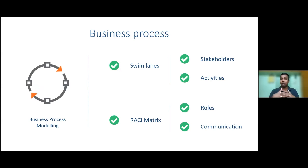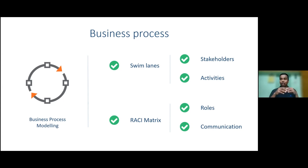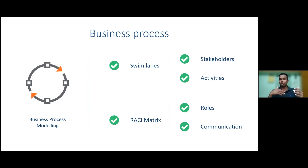The next step is the RACI matrix — Responsible, Accountable, Consulted, and Informed. You take all your stakeholders, chart what roles they play and what activities they do, then fill out the matrix. Once done, communicate it to all stakeholders, run a consultation process, settle on it, and then it helps with change management — everyone knows what they're expected to deliver and when.